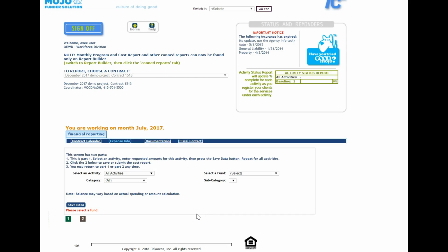Refer to the email sent by your grant coordinator identifying minimally the issues that caused the rejection. Remember that your grant coordinator may not identify all the issues with your invoice before rejecting it, so you will need to check and adjust what they identified as well as review the rest of the invoice to ensure the math is correct, the correct documents are uploaded for each line item, and that there are no ineligible costs being claimed.